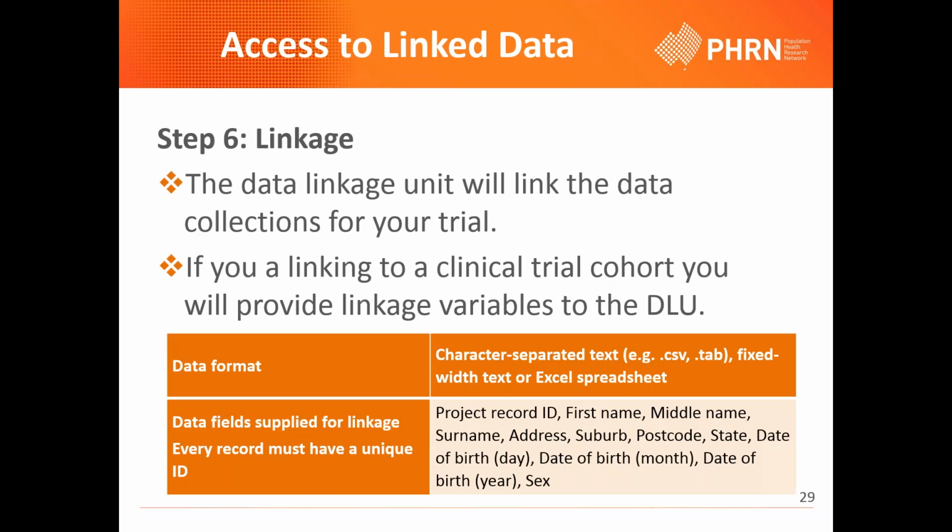Felicity described the linkage process previously. The data linkage unit will link the data collections for your trial. I'll just make a note that data linkage units often are working at capacity, and there is usually a queue for linkage. So that's something that may need to be factored into project timelines.